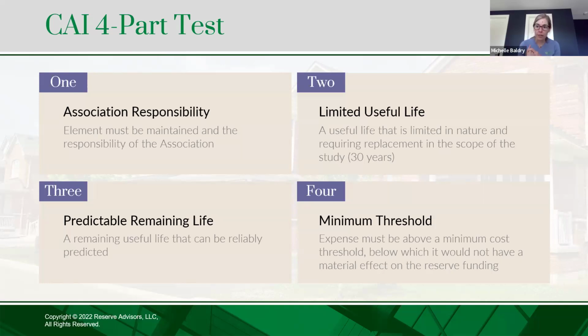So in a brand new community, again, that pool structure will not be included as a line item or as a component in the study. Again, a lot of reserve expenses associated with maintaining that pool, but not that full pool replacement. Now, as the community ages, that pool structure will work into the reserve study similar to the piping and the plumbing. So it really is focused on a 30-year horizon, any expenses that we anticipate during that time period.